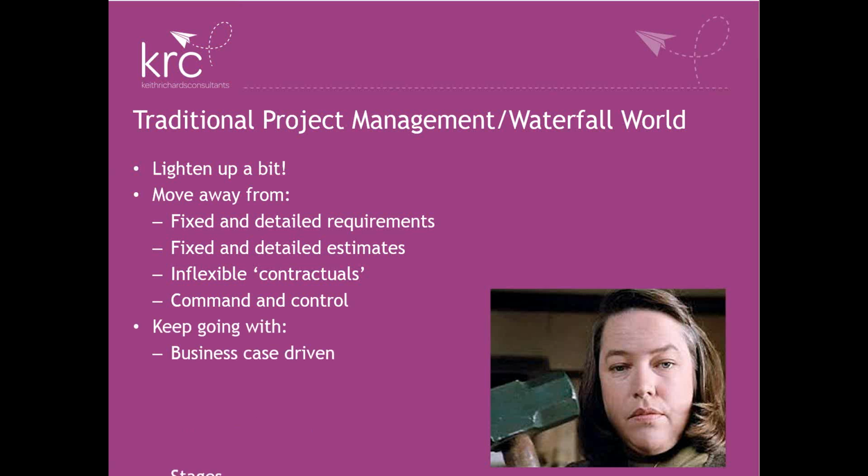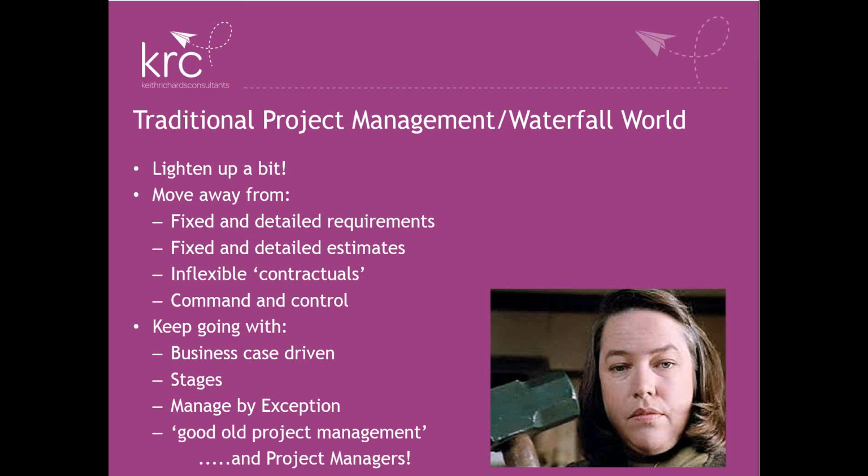But the ones you need to keep going with in this bigger picture, the traditional way, we need a business case, things like management stages to check the business case is okay. Certainly this idea of exception management at the board level, something promoted by PRINCE2, the idea of letting people get on with it, but giving them a boundary, telling them that if this happens, I need some information. But actually good old-fashioned project management and project managers can provide a lot of value add to working in this Agile way.